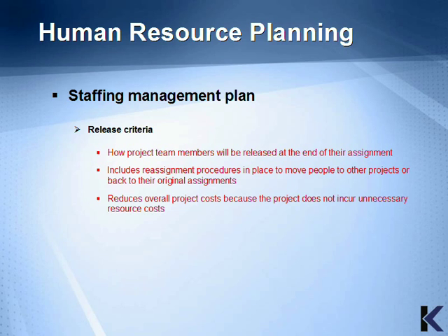The release criteria describes how project team members will be released at the end of their assignment. It includes reassignment procedures in place to move people to other projects or back to their original assignments. And it reduces overall project costs because the project does not incur unnecessary resource costs.